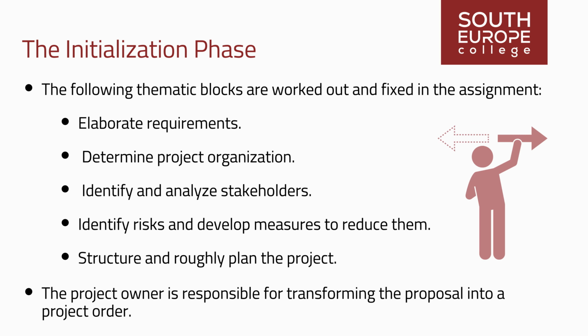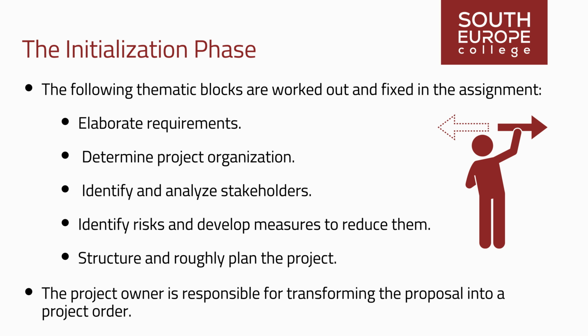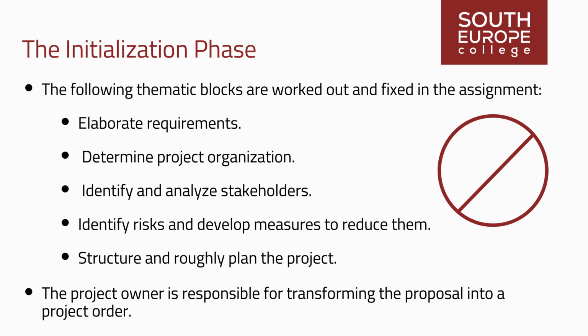The project owner is responsible for transforming the proposal into a project order. From a tactical point of view, the project owner often delegates the preparation of the project proposal to the project manager, who conducts the kickoff at the end of the phase. If one decides to abandon the project at the end of the initialization phase, this is neither a mistake nor some kind of failure, but rather a conscious decision based on newly attained knowledge.